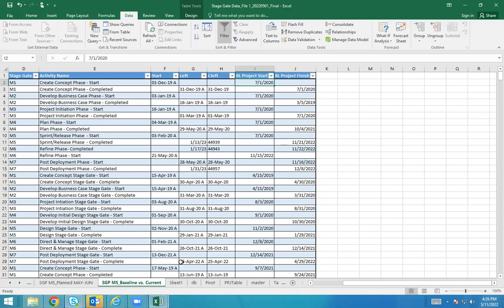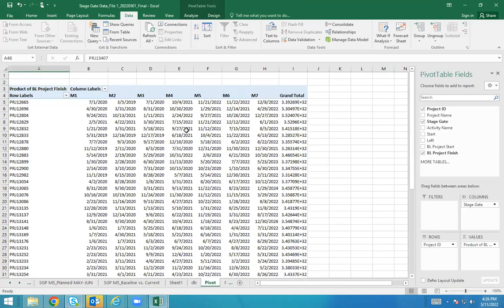to keep doing checking. And what I do is I do the count of these pivots first. Instead of using the date directly, I'll first do the count, and I can see if it's more than 7, that means some dates are duplicated. Then you look at that project ID, figure out where the date is duplicated, and you can clean it up.